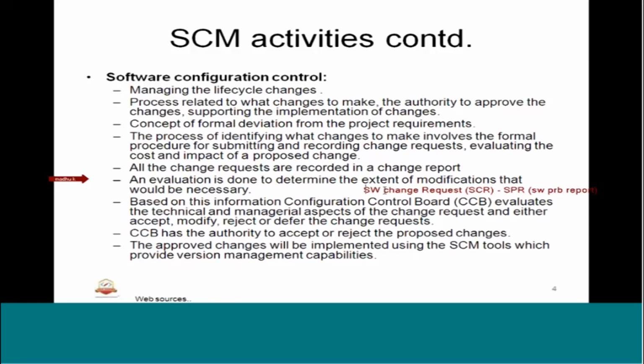And in some projects these changes are communicated using defect tracking tools such as Bugzilla. For a particular change, a bug is opened and all communications are done through that bug, and relevant stakeholders should be communicated accordingly. So that itself will become an SCR, or software change request, maintained within the tool, and it automatically records who owns that change, who is responsible, and who is doing the evaluation. All this will be taken care of.